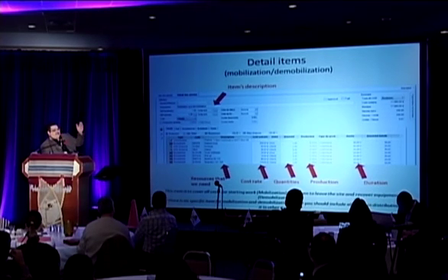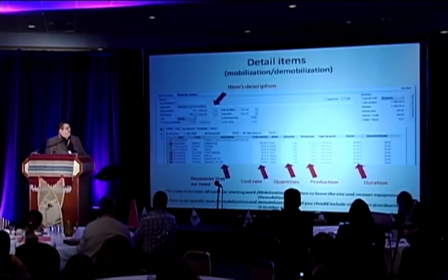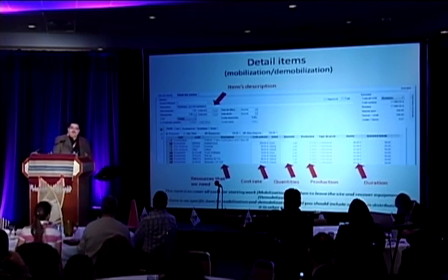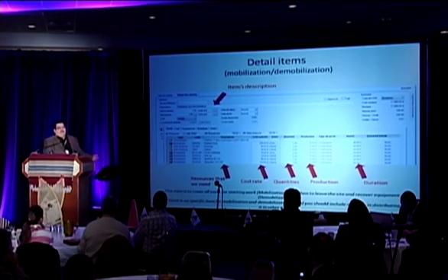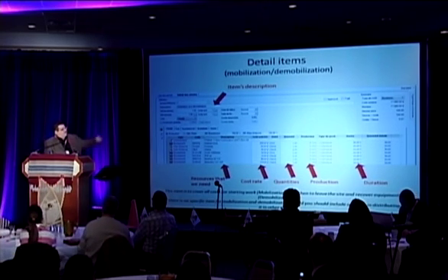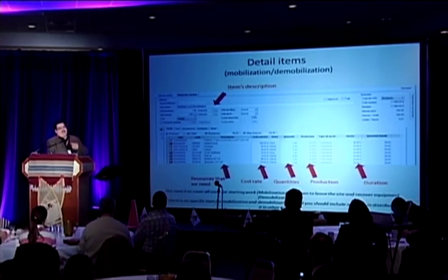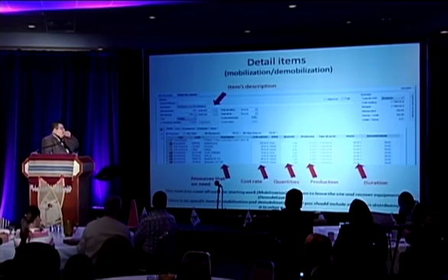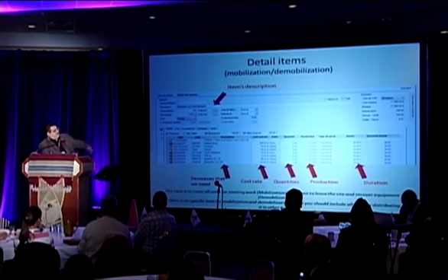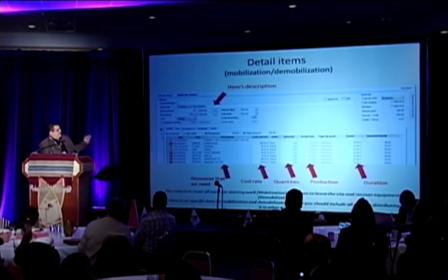Production is unique to each company. When you're calculating how many meters of storm sewer you install in a day, our company might do so much, but another company might be faster. So when you're calculating how many meters, it's really from your own experience and knowing your manpower and their productivity, and also your equipment, the quality of your equipment. And then you have the durée, which is the duration of each activity.